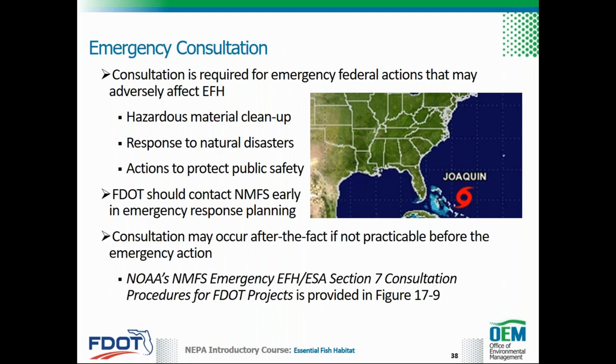Consultation is required for emergency federal actions that may adversely affect EFH. These actions include hazardous material cleanup, response to natural disasters, or actions to protect public safety. FDOT should contact NMFS early in emergency response planning. Consultation may occur after the fact if not practicable before the emergency action.